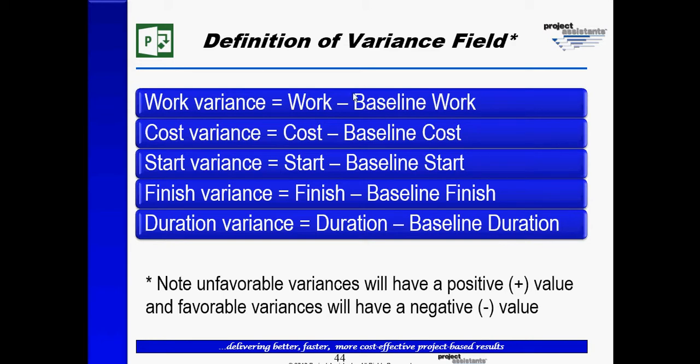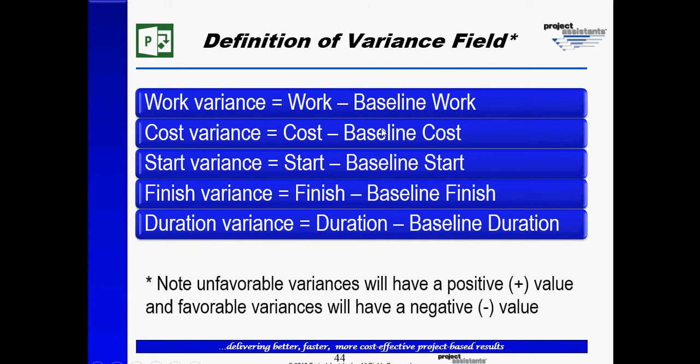The baseline cost contains the original estimated field, which was copied from the cost field to the baseline cost field when we baselined our plan. Any time the cost now changes and becomes different than the baseline cost, Microsoft Project will generate a cost variance.